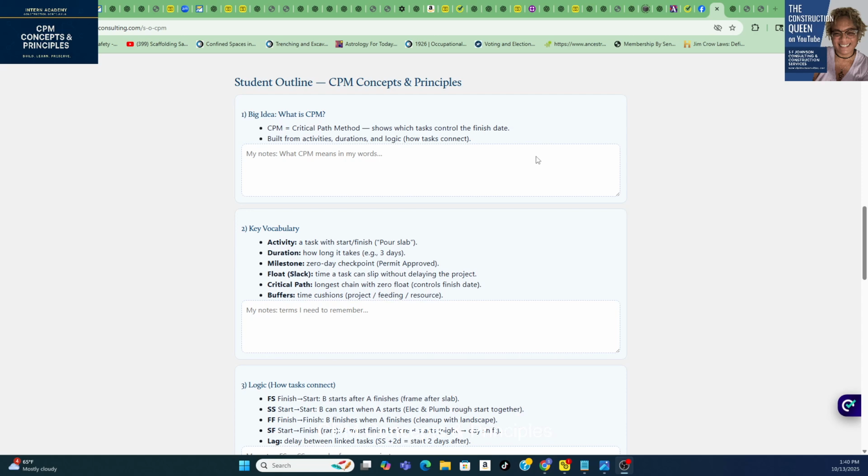Okay? Because you got to know who comes first, second, or third. Well, you only know who comes first, second, or third if you know how long his part is going to take. And how, again, how do you know how long his part's going to take? Well, there's a construction industry standard for how long it takes for you to do everything in construction. And so if you know you're doing 1,000 of those things, linear feet, square feet, whatever each, then you know how long it's going to take. It's really that simple. And it's really just math.